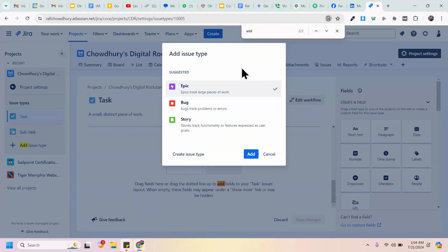If the stories have been completed, tracked, and tested, that's when you would say all the requirements have been captured and tracked to closure, and this epic has been completed because all these functionalities and features have been satisfied and fulfilled.